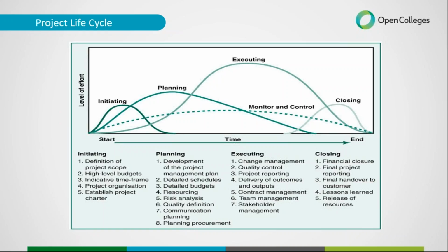And then eventually the project will come to an end and we will hand over that product or the service. We'll do our final reporting, close it off, do our lessons learned, look back at what worked, what didn't work, document it, so we move forward. And that's that closing stage of the project, or the completion stage or the finalization stage. Different industries and companies will use different terms, but basically every project follows this life cycle.